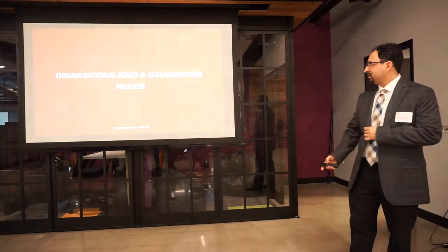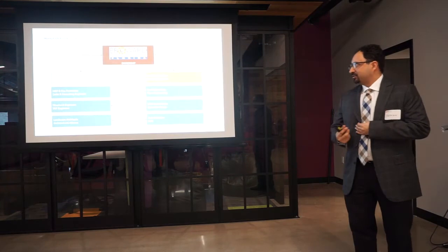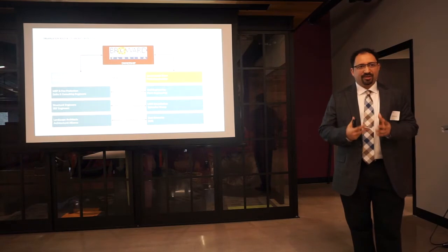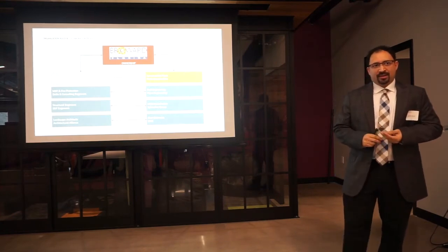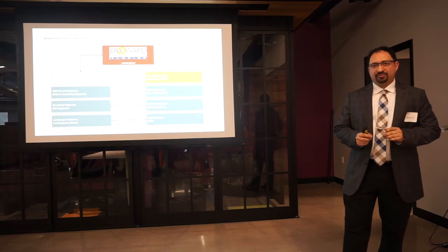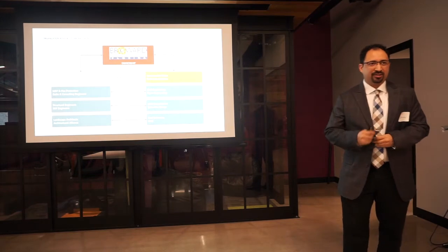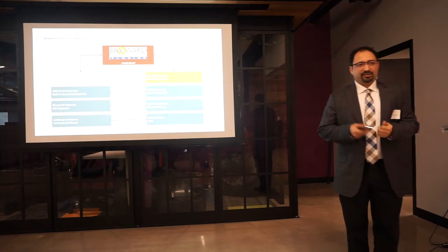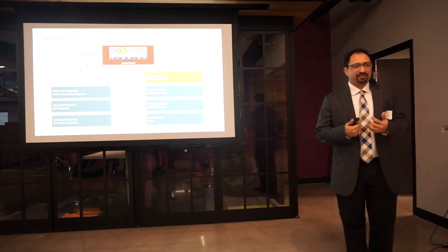Let's talk about the organizational roles we had in the project. This graphic shows how we handled our organization in the project. We entered this into our BIM execution plan specifically because the state, the county, was very strict about the chain of command, and all engineering firms were under the architect. Anything we were going to discuss with the construction engineer had to go through the county first, and vice versa. So if an RFI was eventually generated, it would have to go to the county first before any of us even saw it.